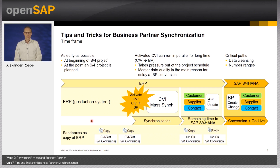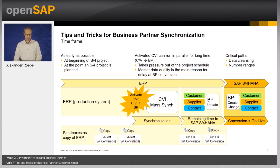We also need to consider the project plan for S4HANA conversion. Usually, the S4HANA conversion is checked in one or more sandboxes as a copy of the productive system. As long as CVI is not activated in the productive system, we have to synchronize all customers and vendors in each sandbox. In addition, we also like to test our business partner synchronization in separate sandboxes. Creation and synchronization of these sandboxes also have to be scheduled, and consequently extend the overall project duration.